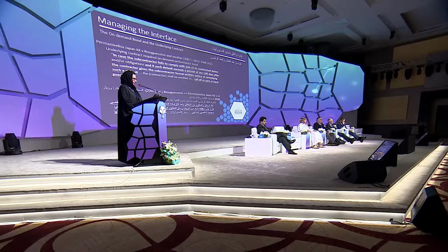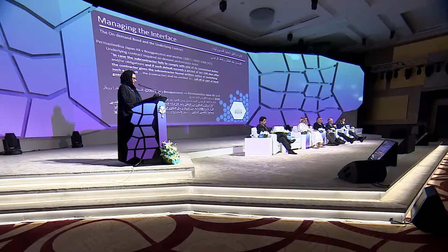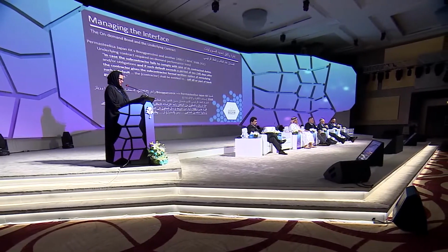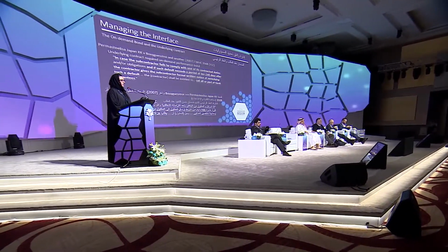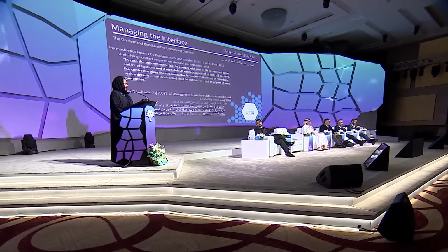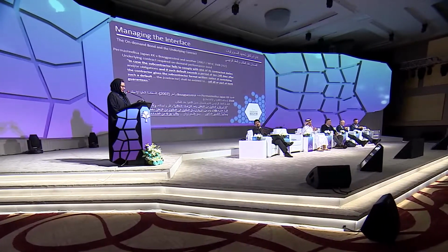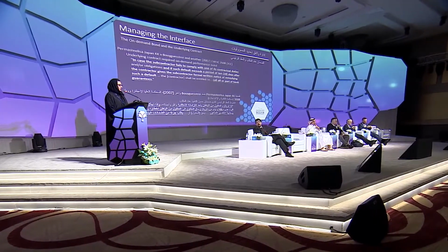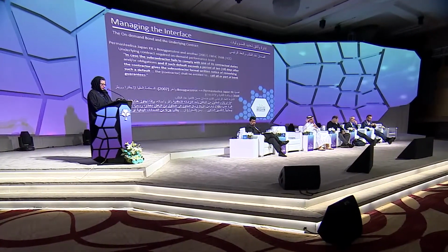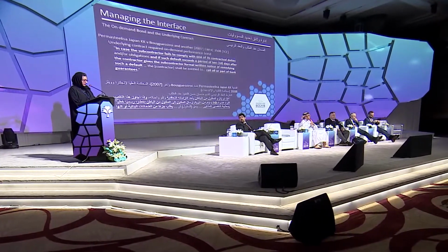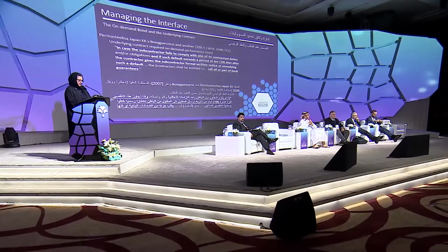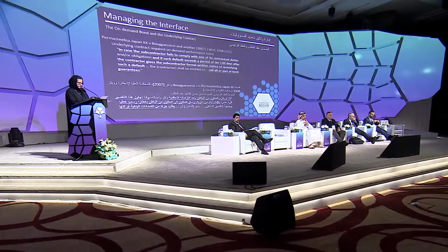The contractor made a successful call of the bond. And the subcontractor responded by seeking an injunction against the contractor, restraining it from making any further calls on the bond. Now, the tribunal was not formed as of yet, so we talked yesterday about court support for arbitration. It was the English court to which the subcontractor approached, and the English court granted an interim injunction against the contractor pending a full hearing.